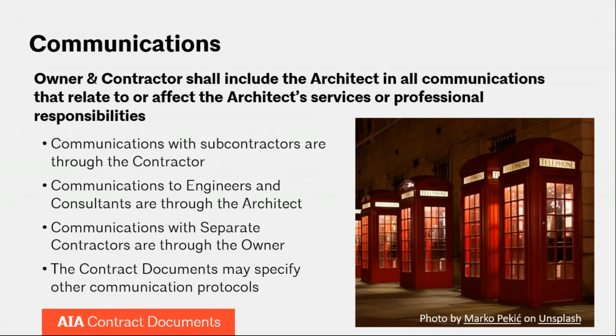The architect is also an important conduit for communications between the owner and contractor. Traditionally, the owner and contractor have been encouraged to discuss all matters related to the project through the architect. But nowadays, in the 2017 version of the A201, the requirement is for the owner and contractor to include the architect in all communications that relate to or affect the architect's services or professional responsibilities.